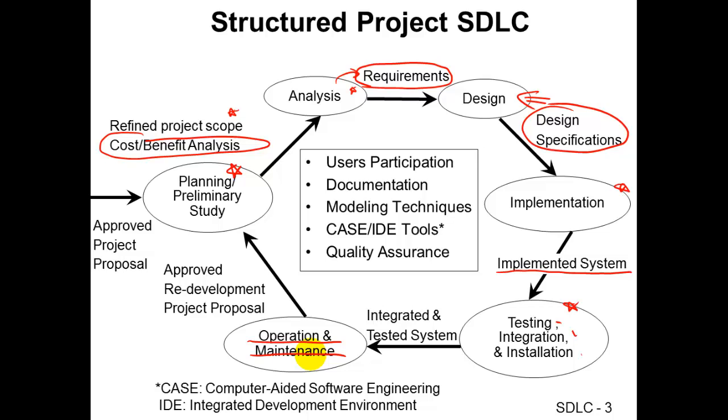Typical software maintenance will probably cost you about 15% of the initial budget in building it. And up to a point, the old system may not be adequate for the changing business environment, and that's where we may come back and actually redevelop a system to replace it. It can be a totally new system or just making some major adjustment to the existing system.